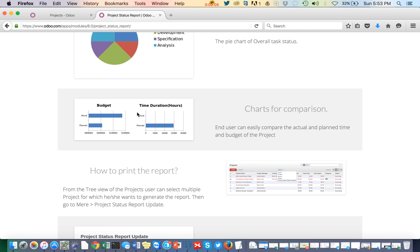The budget will be calculated based on the number of hours estimated and the employee who is going to work on the task. We have a configuration available in HR where each employee is associated with a service type of product, and we have hourly, weekly, or monthly rates available for that particular service type.